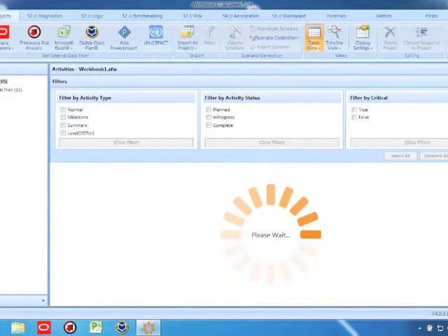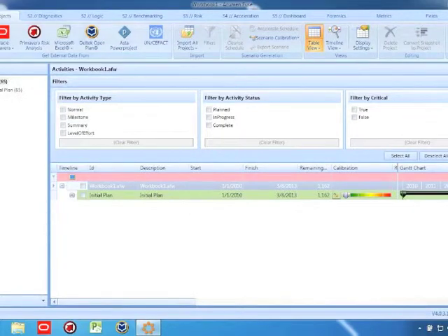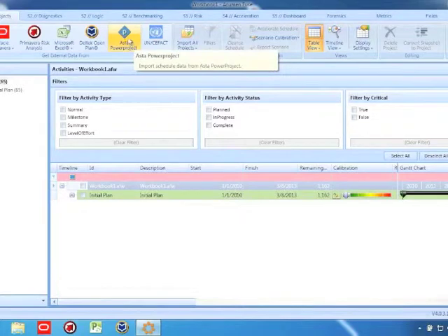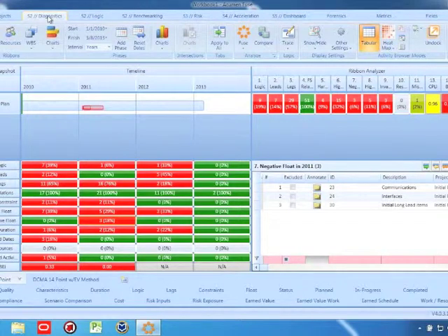And what I've done is I've loaded an MS Project file called Initial Plan. It's got about 65 activities in it. You can see some of the different tools that I can use to pull in schedules and information into Fuse. And I'm going to go right for this diagnostics screen. And I see a lot of red, so already I'm panicked. Let me give you the landscape here. I've pulled up the DCMA 14-point assessment, which I guarantee they'll be running on your CEFACT submitted schedules. You can see I have many other tabs here as well. So for me, the DCMA 14-point is just a starting point. To be straight and honest, I've failed many of the checks, and you can see that very easily because there's red on the screen.